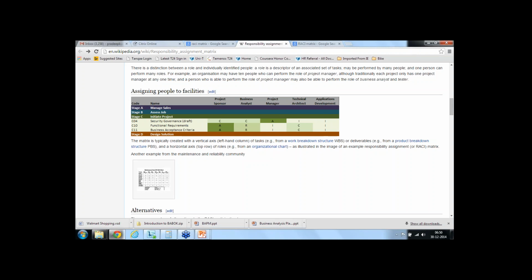You can go up, or you can use 0.1, 0.11, like that. So you need to know how many versions are likely to be produced as part of your business analysis exercise. This information you will come to know when you are on a project, because you will know the stakeholders and what kind of feedback or response you get from them. If you expect frequent changes, it's always preferable to use 0.01 so that you have space till 99 iterations.